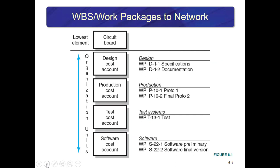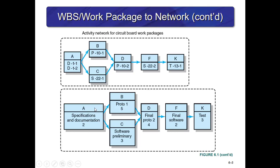This diagram illustrates how the WBS transfers to a network. It shows the lowest element, the circuit board, and all the different organizational units involved in that particular work package. The next slide shows the network diagram of activities A, B, C through D, F, and K, showing that A is an activity that involves D1-1 and D1-2. The work package rolls up into the network diagram.